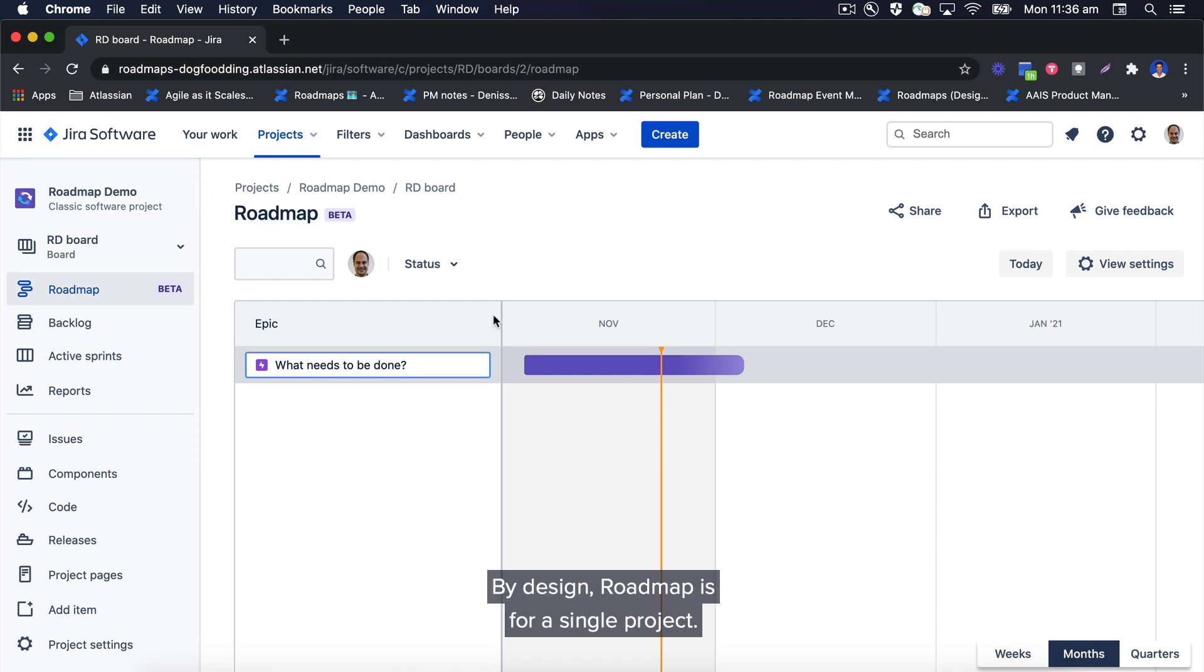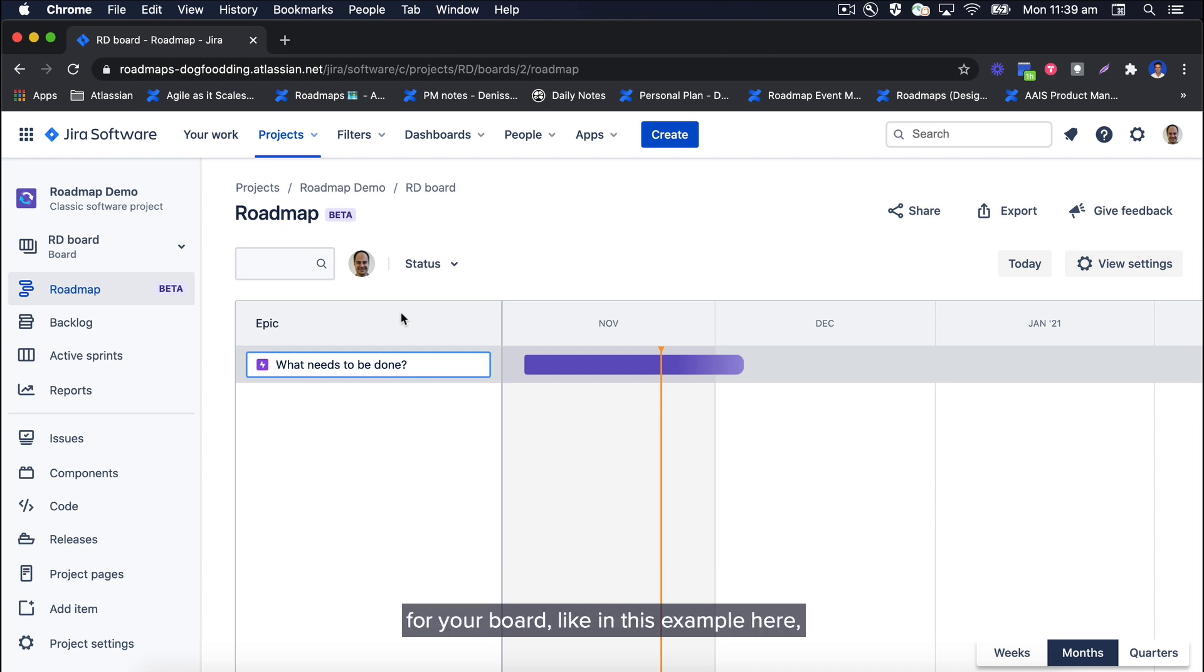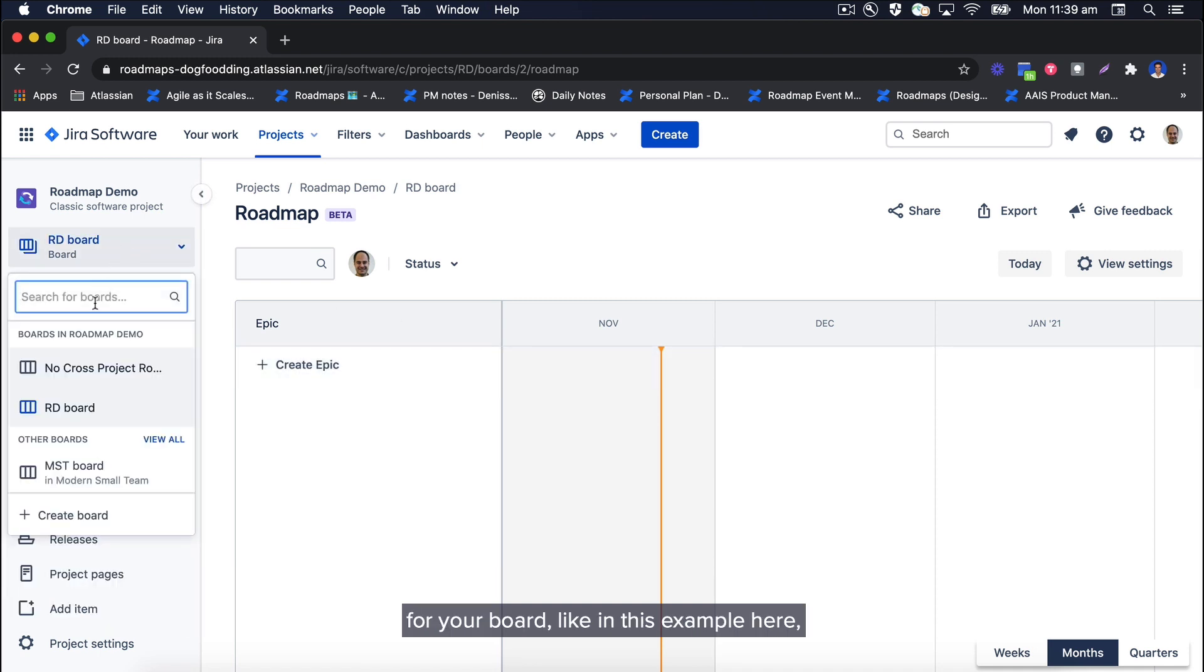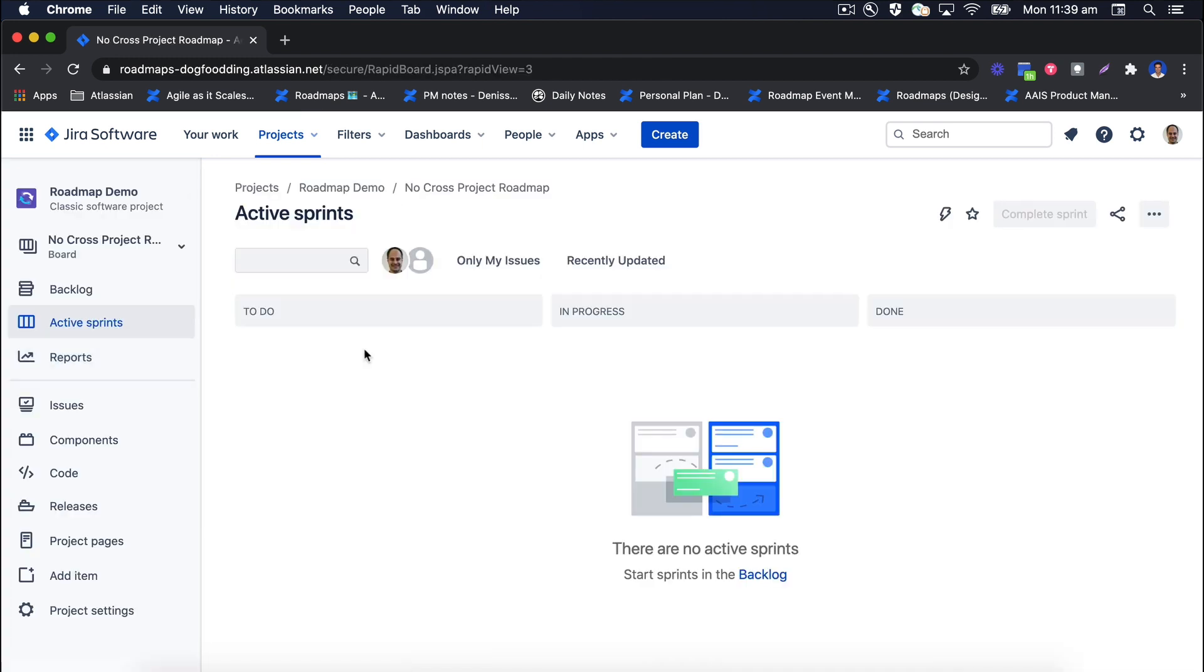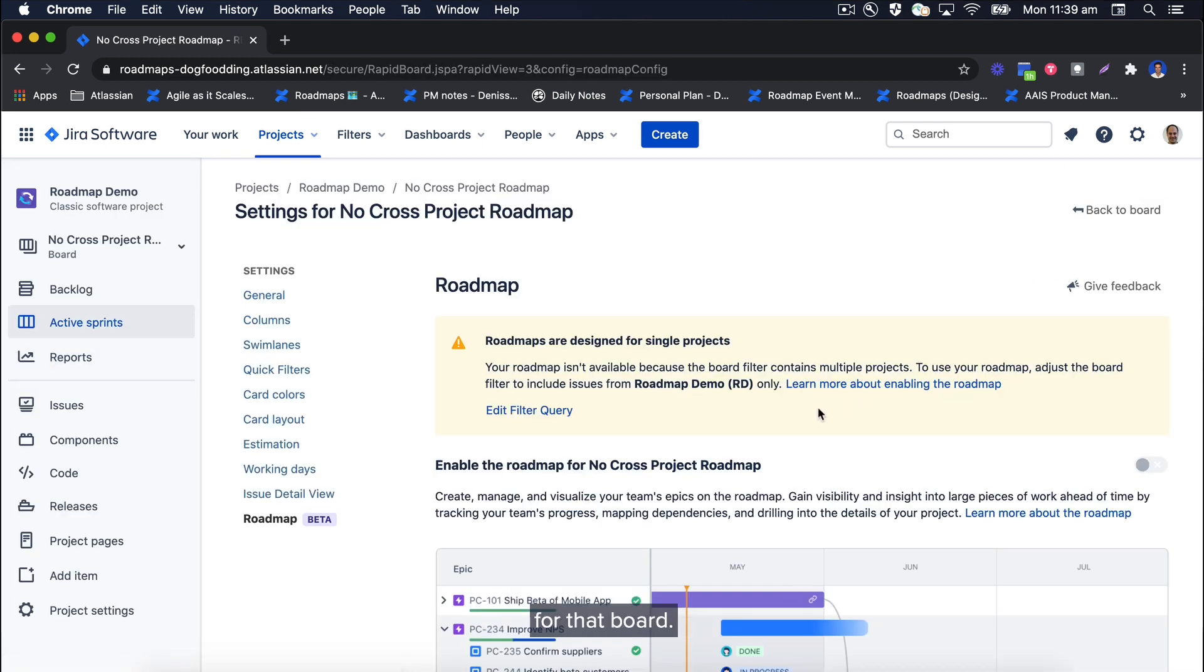By design, roadmap is for a single project. This means that if you're using cross-project JQL for your board, like in this example here, it will not be possible to enable the roadmap for that board.